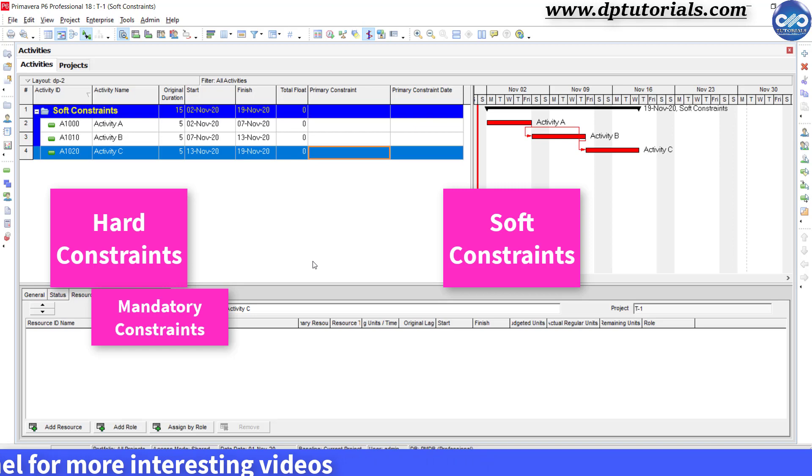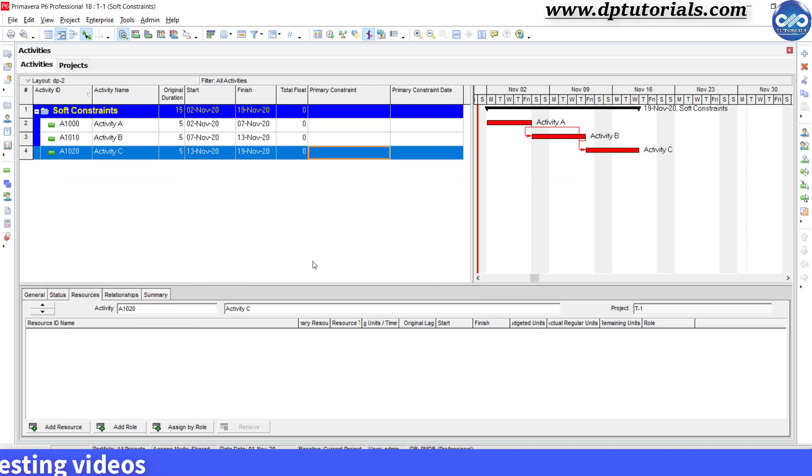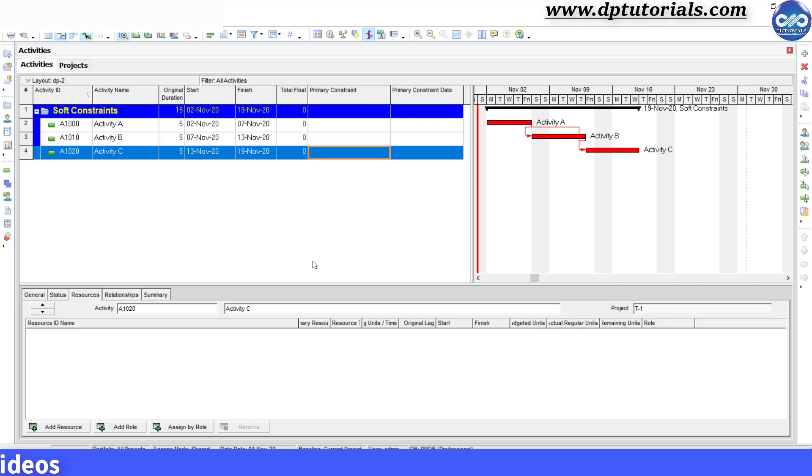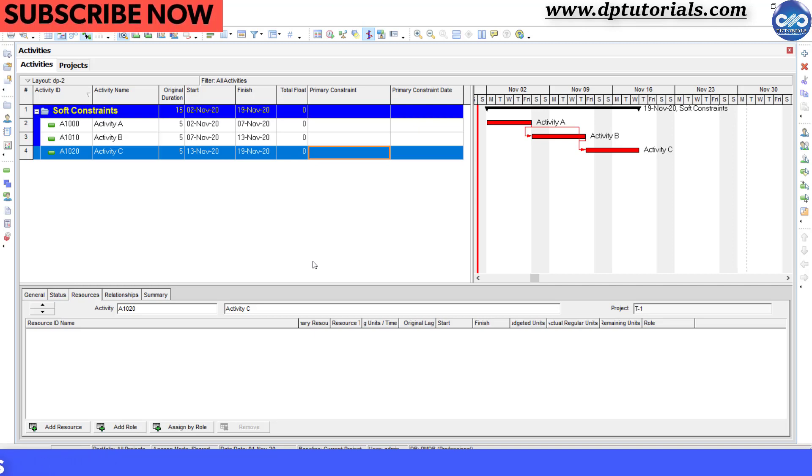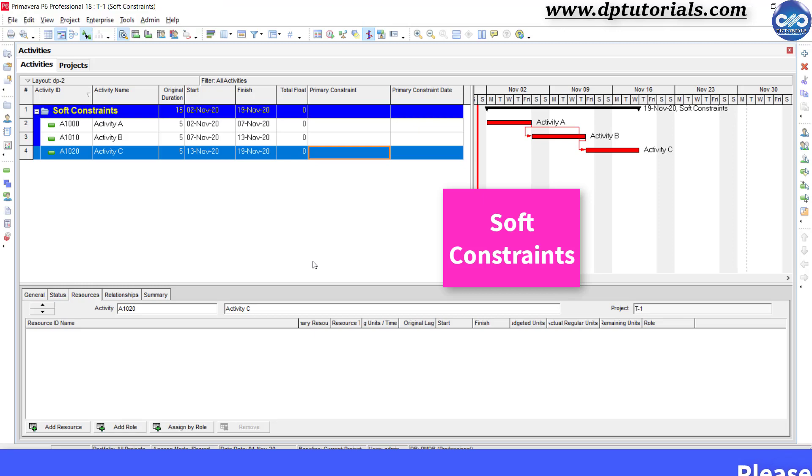Hard constraints like mandatory start and mandatory finish fix to the date and can violate the relationship logic. But whereas soft constraints other than mandatory constraints follow the constraint and give priority to the relationships.